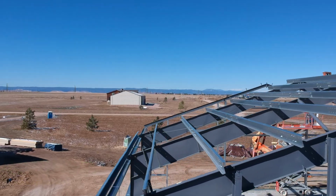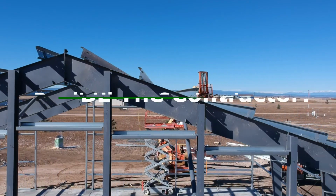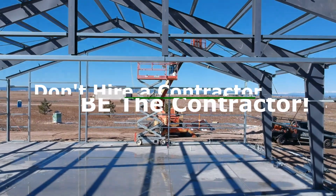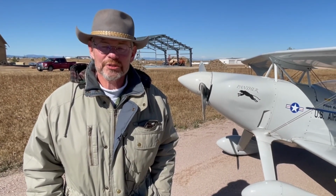No markup, no additional. And so even though in some cases materials have gone up, the HomeWrights fee has stayed the same. Yeah. And where HomeWrights has been really helpful is helping us find better deals. We had to put in the work, but the idea to go look somewhere else or where to go look and how to compete in order to get the cost, even in this environment where costs are kind of going up in many cases, has enabled us to save ourselves some money. And right now, even in spite of the increased costs, we are still on budget.